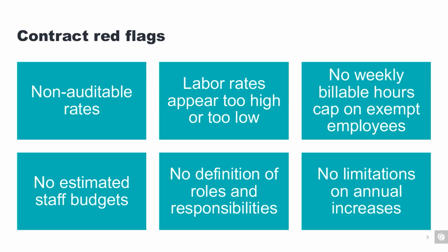Typically, the basis for a guaranteed maximum price contract is actual cost, and therefore, while a salaried employee may work more than 40 hours in a given week, as most of us often do, there's no additional cost related to this time, and therefore it should not result in additional billings. So a best practice here is to set weekly limits for salaried employees directly in the contract and require approval of overtime for any hourly employees.